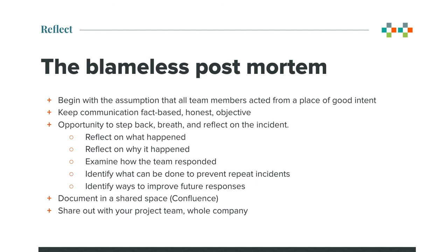The key tenets for any blameless postmortem are to 1, avoid blame, 2, keep it constructive, 3, collaborate and share knowledge, and 4th, perhaps the most important, identify preventative actions.